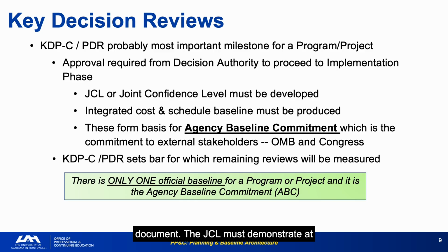The JCL must demonstrate at least 70% confidence that the program can meet its cost and schedule commitments. If it doesn't, you do not pass the gate without significant replanning. All subsequent reviews, CDR, SIR, FRR, are measured against the bar set at KDPC. Get the baseline right at PDR, and you give the program a fighting chance. Get it wrong, and you are explaining divergence for years.